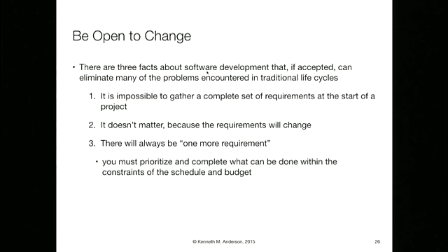And this requirement that you gave me that's scary and vague and big, I don't understand it right now. And I think that you don't understand it either. So let's go work on things that we do understand. And maybe as we talk about it, the thing that's currently murky and big will become less big and more defined. And then less big, more defined. And, oh, I can do that in 2 weeks. You just tackle it as more knowledge comes in. So this is the reason why we try to get things scoped way down. We work in short cycles. Our ability to estimate, our confidence behind those estimates, goes way up.